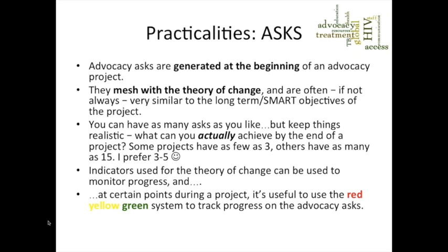I mentioned earlier I'm working with one that has 15, but 15 is fine, but it just would make it more difficult to track during a project, 15 as opposed to 3 or 4 or 5. And also at the end, how would you demonstrate you'd actually achieved anything in those 15 asks? It'd be a very paper-intensive exercise.